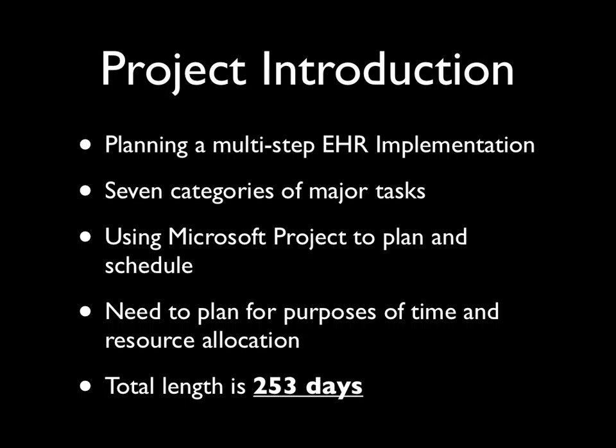We will be using Microsoft Project to plan and schedule the EHR implementation. Microsoft Project creates critical path schedules that track progress and help to plan projects in terms of time and resource allocation. As will be shown in the remaining slides, the total length of this project is 253 days.